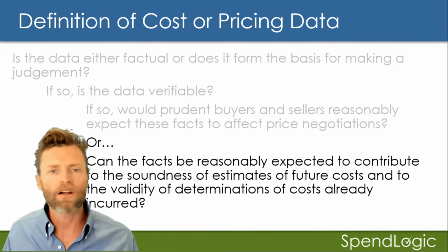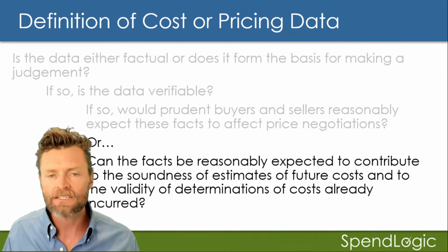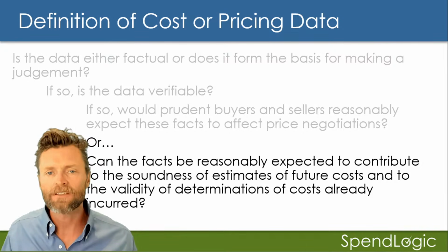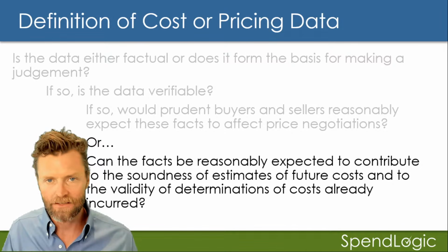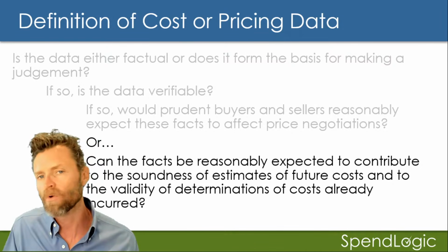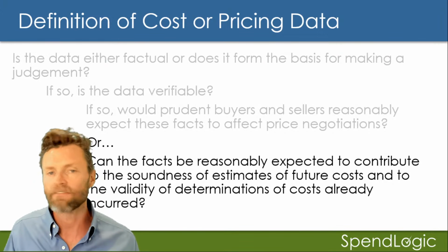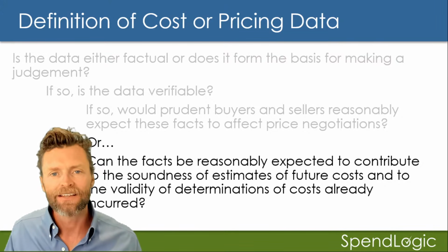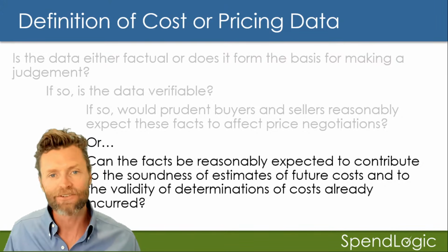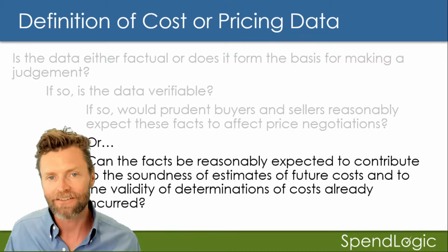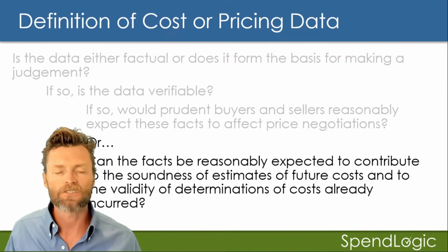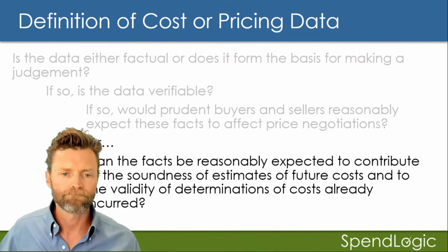You can get into the FAR and get much more scientific about this. If there's a question as to whether it's cost or pricing data, if you're a supplier and you don't know whether you should include it or not, either reach out to an expert or get into the FAR and figure it out, because this is really important. If you don't include something and you certify that you did include everything and you're current, accurate, and complete, there are some big penalties. So you don't want to screw this up.